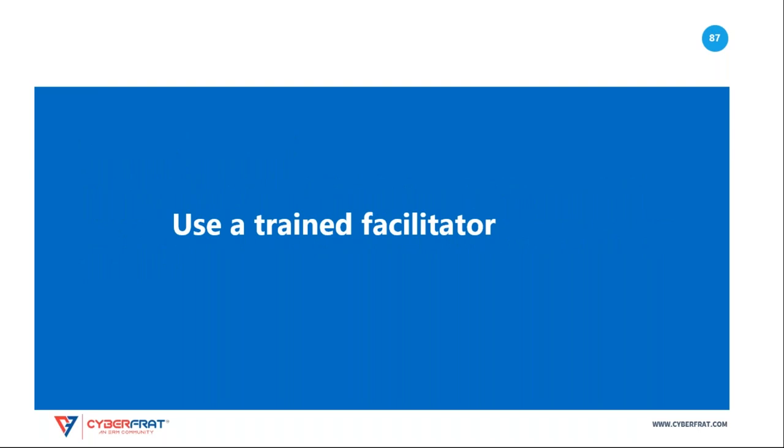The most common way to conduct lessons learned is to gather everyone in the same room or connect them via teleconferencing or video conferencing and ask a trained facilitator to lead a lessons learned session. Ideally, this facilitator should have played no role in the incident response, leaving him or her with no preconceived notions about the response. The facilitator should be a neutral party who simply helps guide the conversation.